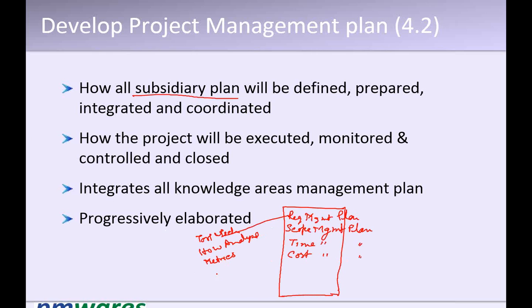Any techniques, let's say I'm going to use the Delphi technique for collecting the requirements, so I will write it down. We will collect the requirements by brainstorming in a meeting. Then we will collect all these ideas through an affinity diagram.